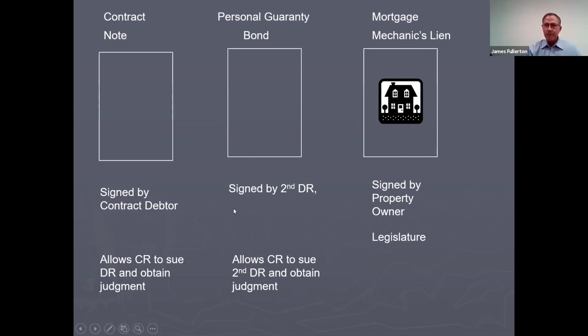But one of the most important points about payment bonds is you do need to worry about that. Who is the bonding company? Are they a large solvent insurance company, or are there problems with sham sureties, surety companies that don't really have any assets, and they usually travel with the construction contractors that are very weak financially?